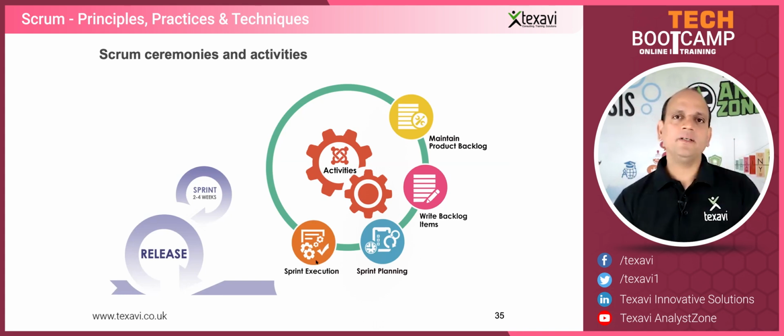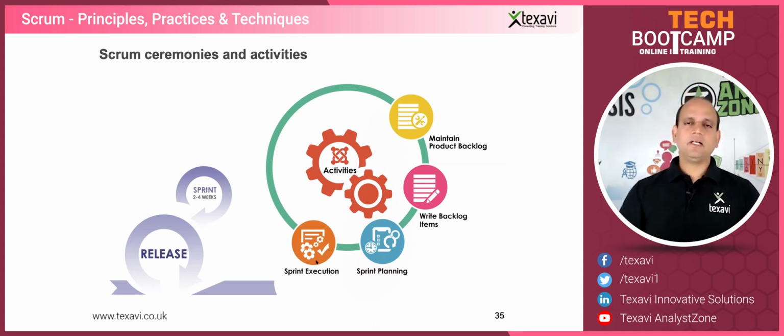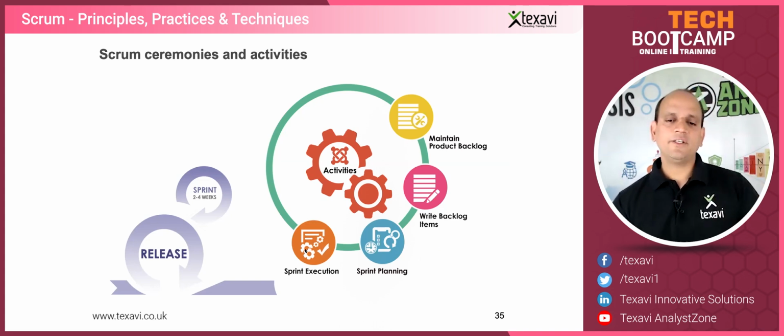And then they accept that, they commit that these are the 7 items we're going to deliver. This is the definition of done. We all accept, and now they start working on the design, development, and then testing of those 7 items. And that's what gets done during the sprint. So our sprint is 3 weeks.